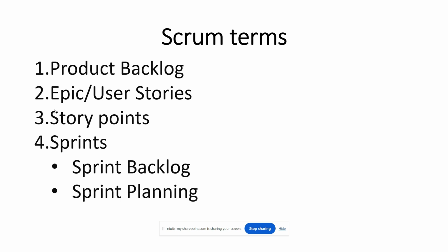So, for example, if you have a value of 1 on one user story and a value of 2 on another, that second one should take about twice as long to do as the one that you assigned 1. It's more proportionality than hours or days or some other type of metrics that you might be used to using for estimations.